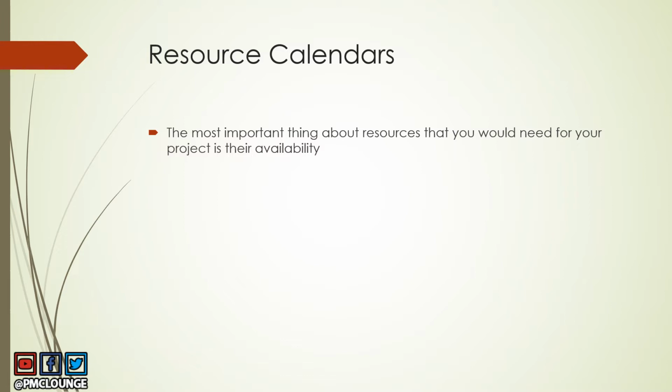We already know that you need all kinds of resources for your project to complete your project. And the most important thing to know about those resources is their availability. When are they available? So resource calendars, which is an input in this process, is going to give you the information of the availability of these resources.